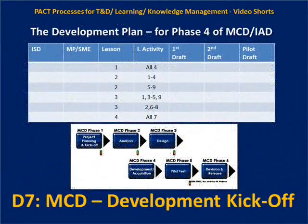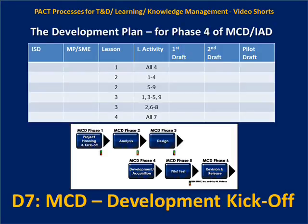Then they can be given their assignments. Some instructional developer will be given lesson one and need to cover all four of the instructional activities. Some master performer or subject matter expert may be identified to work with that instructional developer. In this case, we're showing that lesson one and all of the activities will be assigned to one set of people — the instructional developer and the master performer and/or subject matter experts. However, when we get to lesson two, we're dividing it up — taking the first four activities and assigning that to one group, and activities five through nine to another.